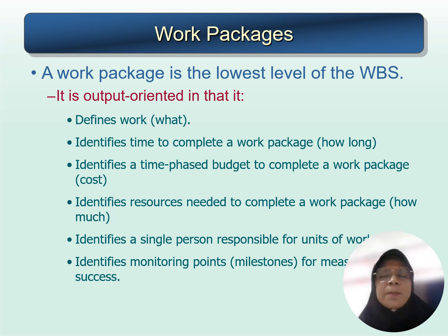Moving on to the work package. A work package is the lowest level of the work breakdown structure, WBS. It is output oriented in that it defines the work, actually what the works are, and it also identifies the time to complete a work package in terms of duration, or how long it will take to complete the work. And then it identifies a time-phased budget to complete a work package, including the cost.